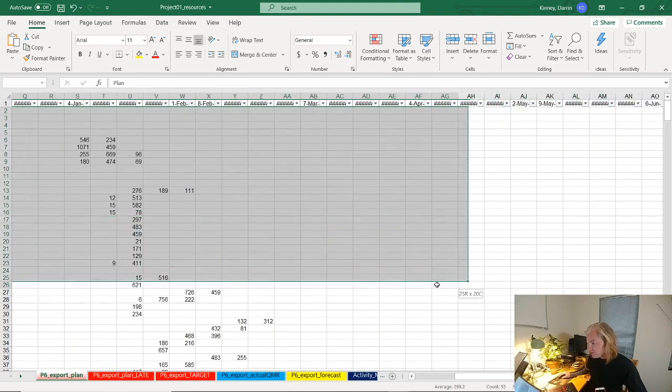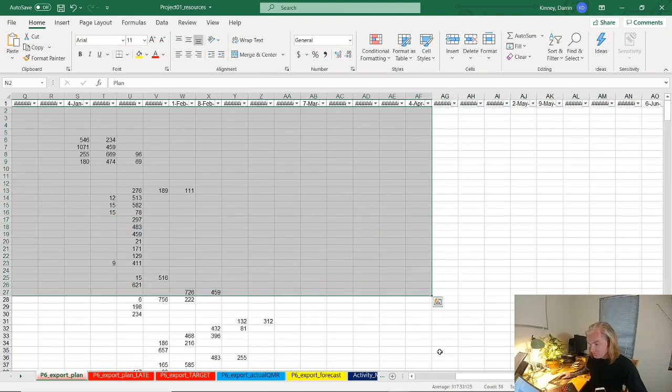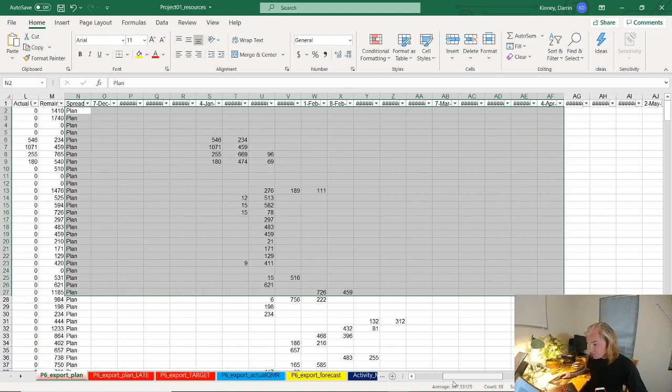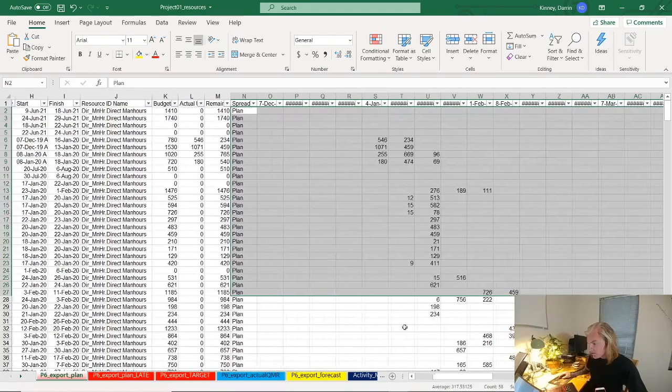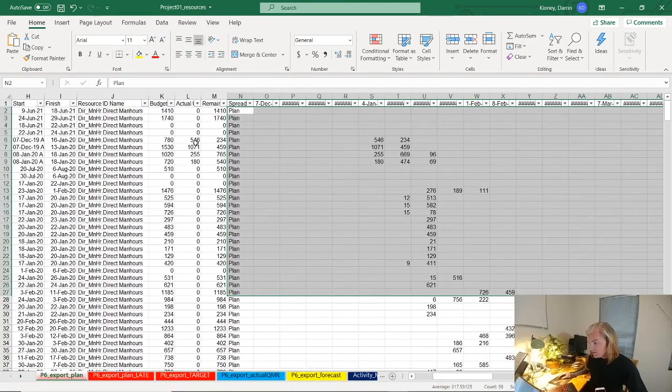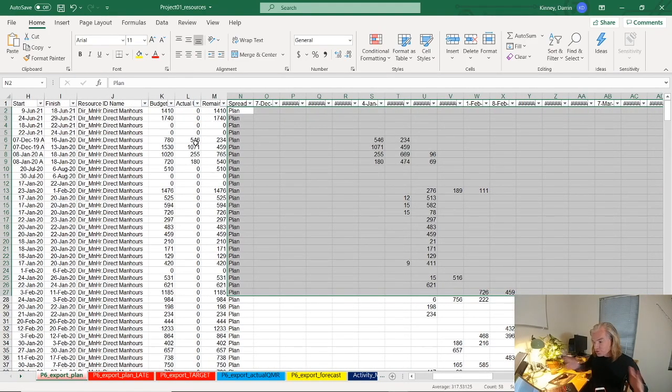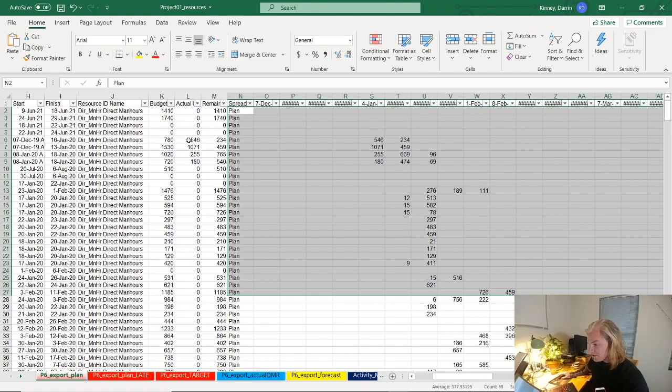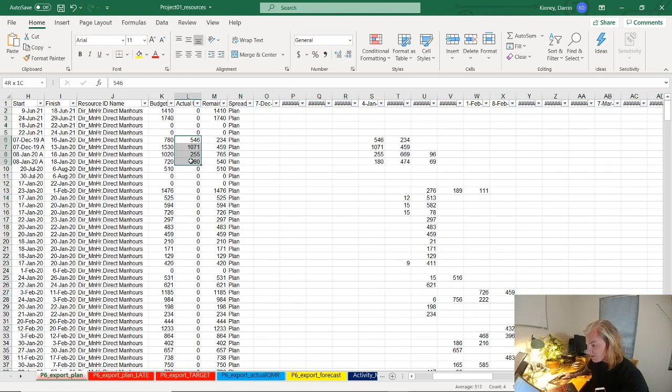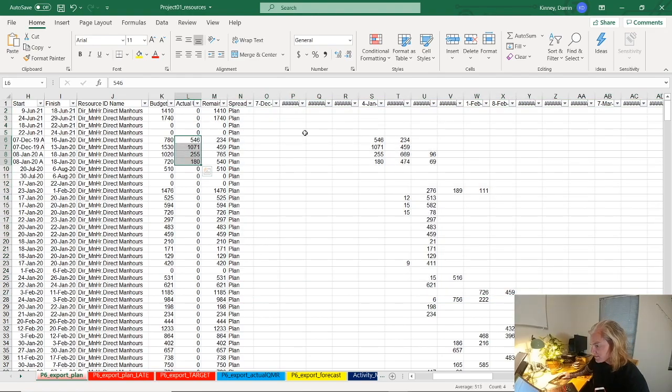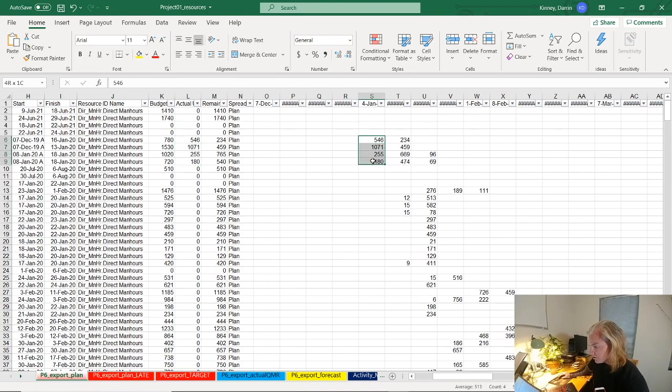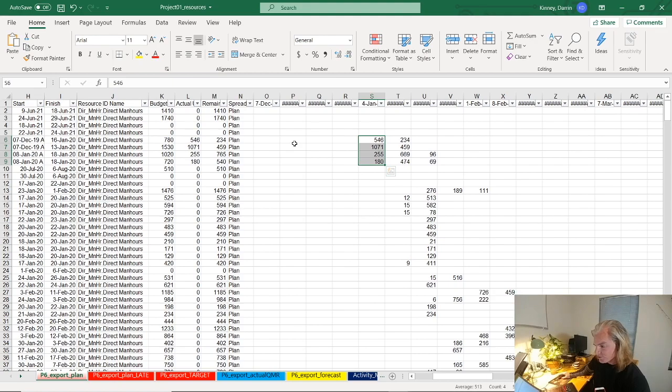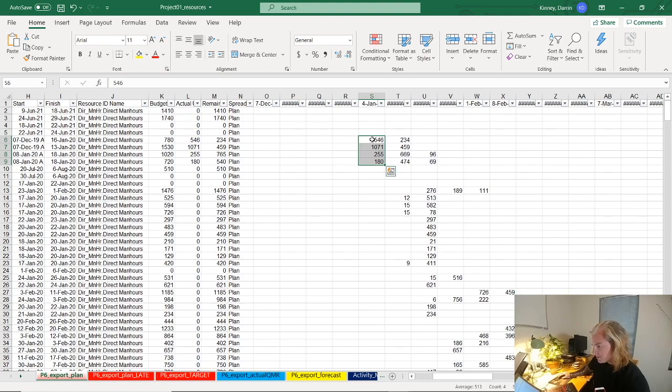You do want to make sure that this is a curve going from zero to a hundred percent. If you don't have activities that have started, it's easy. If you do have some activities where there's actuals to date sitting in your baseline, you want to make sure that you actually insert a prior actual so that you do have a profile that goes from zero to a hundred. If something's off, your data won't come across in Power BI.